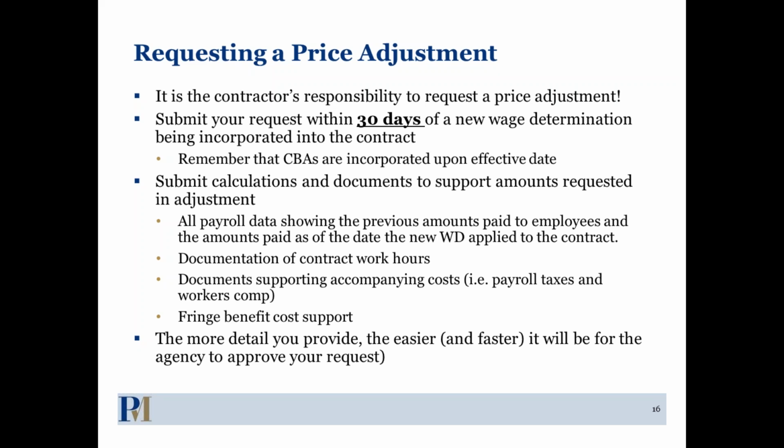You had a 40-cent delta, and then you look back in the last 12 months and you say, okay, well, we did end up working about 2,000 hours per person and this many people, and you need to demonstrate that through payroll, what your deltas are, how many hours were worked. If there are substantial differences between the last year and this year, you'd have to justify that in your equitable adjustment request.